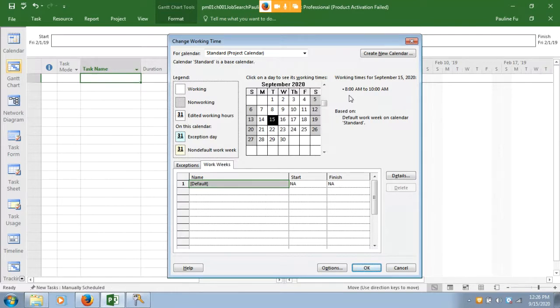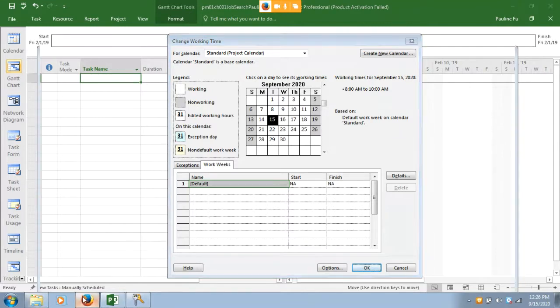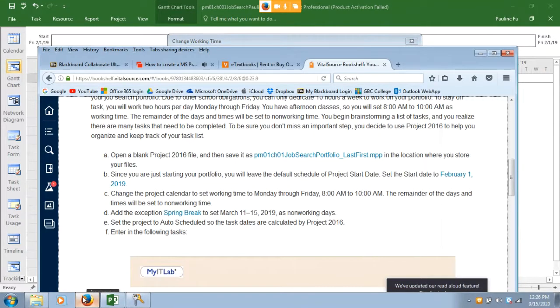Okay, so you modified your schedule. Okay. So that is a step. Let me check. Yeah, we did step C. Okay, change working time. Okay. Step D, add exception, spring break, March 11 to 15 as non-working days. Step D.